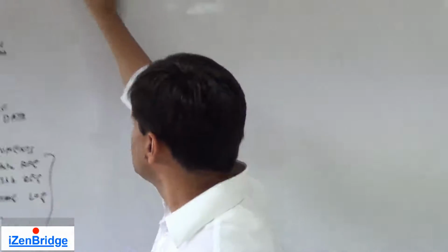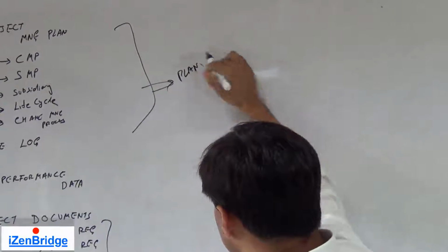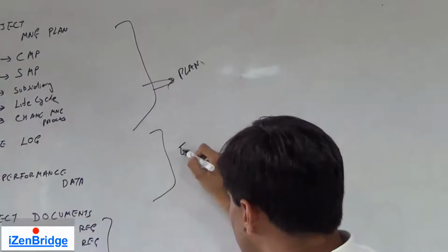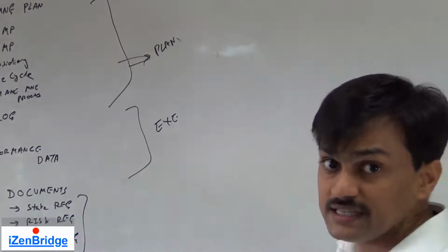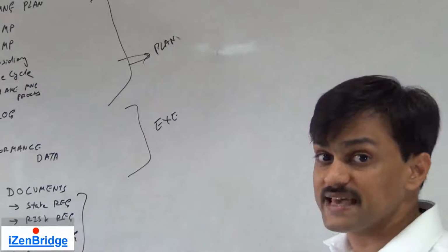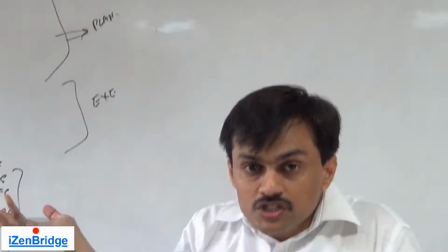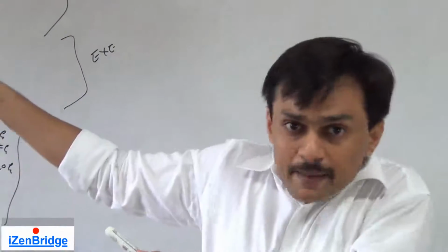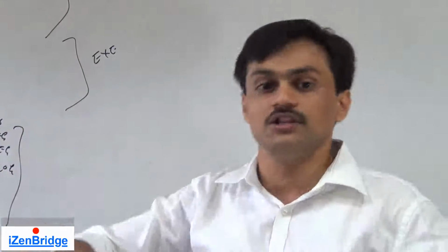Now, with all these inputs, we need to put primarily the expert judgment. We need to look at what was planned, and what is coming from execution. Now, if we see some gaps here, if we see that stakeholders are not engaging as expected, we need to take some corrective and preventive actions in the form of change requests. So if we find some gaps, we generate the change request. In order to find those gaps, we need to put our expert judgment in the form of meetings.